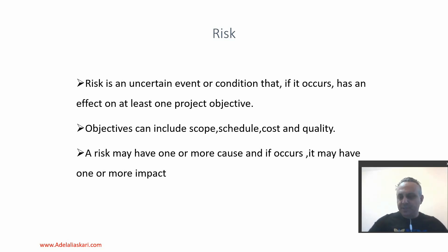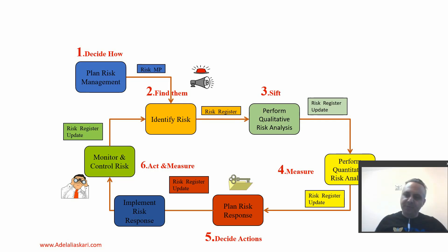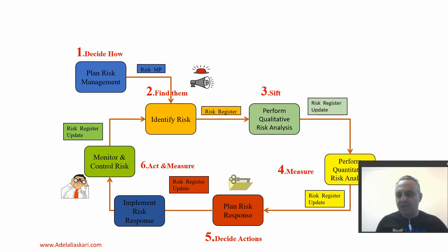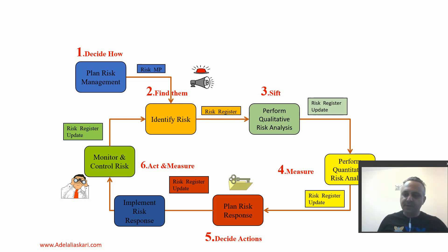We will start with creating the risk management document. In this document, we will write down the ways of risk identification and the definition of project probability and impacts, depending on the scale of the project. We may also document the regulations and related standards for risk identification and management in our organization, and define the reporting regulations and report templates.